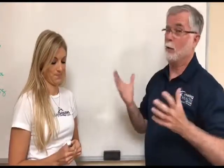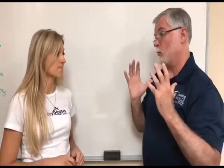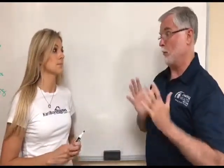So what's number 1? Well, actually, before we get to number 1, why do you want to avoid these mistakes? For an investor, time is our biggest enemy, because every day we hold a house, it's costing us. We're paying taxes, we're paying for insurance. If we have borrowed money, we're paying interest. So we really want to think about the acquisition of a house as sort of a race. You don't want to race into the deal, but once you are on title, either you or your trustee, however you've taken title, you really now need to manage the clock very effectively.